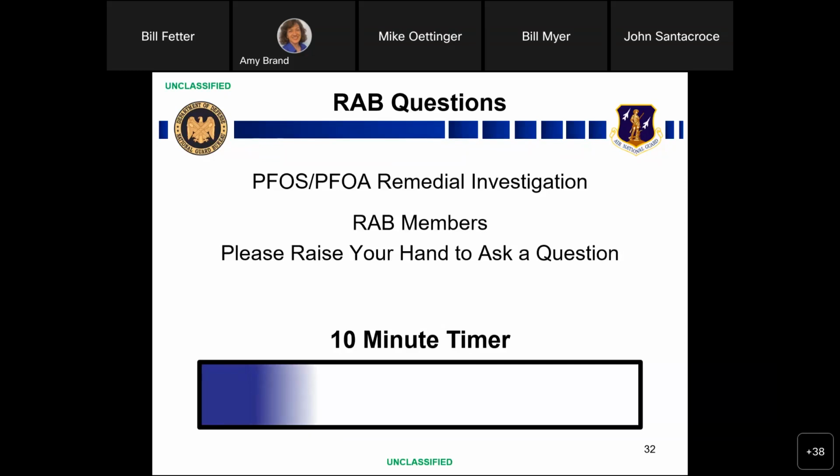A large majority of it. What's a typical mobilization cost? This took us 25 days. But the cost just for mobilizing the equipment, how much is that? The mobilization is $1,500 to mobilize the equipment and the minimum crew. Yeah, it's not expensive. It's operating and days on site that cost the money, not the mobilization. It's a semi-local contractor, from East Westchester County.